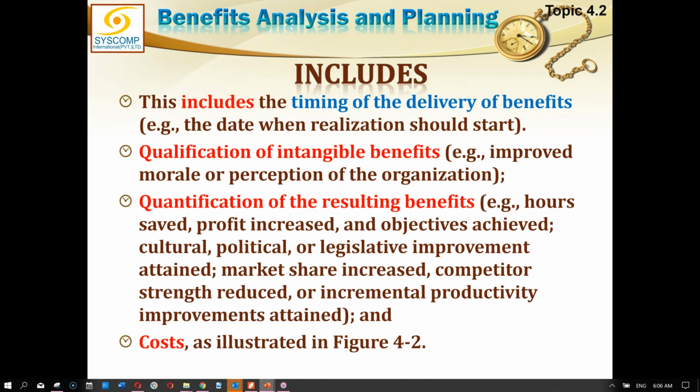So what I would say is that if we are talking in terms of benefits, then we are talking in terms of success criteria. If we are talking in terms of outputs or deliverables, then we are talking in terms of acceptance criteria. Because the word acceptance criteria is mostly used for projects, and the word success criteria you usually find for programs. Do you understand this point? But does that make any difference, or do you still think that acceptance and success are the same thing?